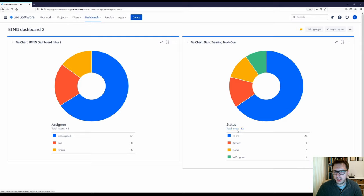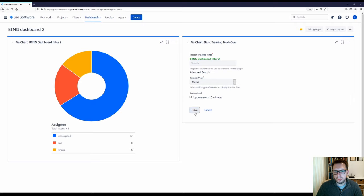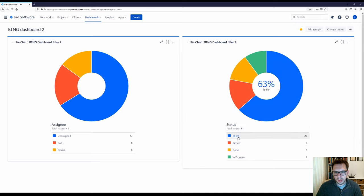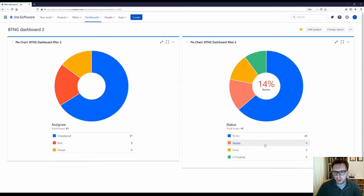I'll do the same thing on the second pie chart — click the three dots, Configure, search for my filter, and Save. And that's also gone from 43 to 41. That way you don't get the epic count polluting the numbers that you see here.